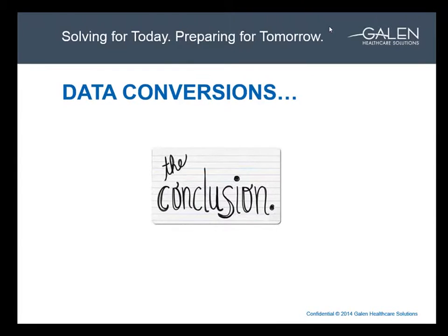Okay. Well, Erin had a slide that she shared where she outlined the methodology: unit testing, small scale, large scale, full scale, and there's a lot of variability from client to client as to how that's defined. But I would just say, and Erin, feel free to jump in here, with unit testing we're really looking to validate one of each data type coming over.